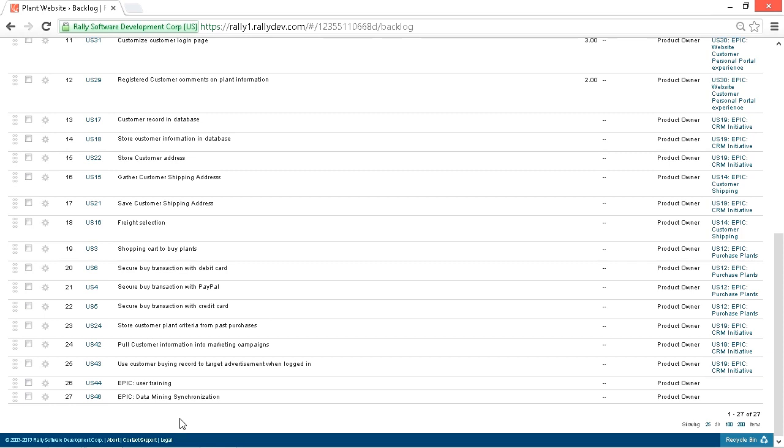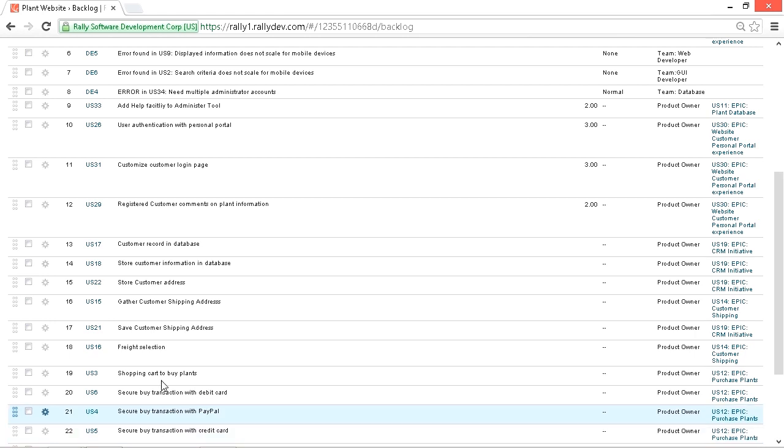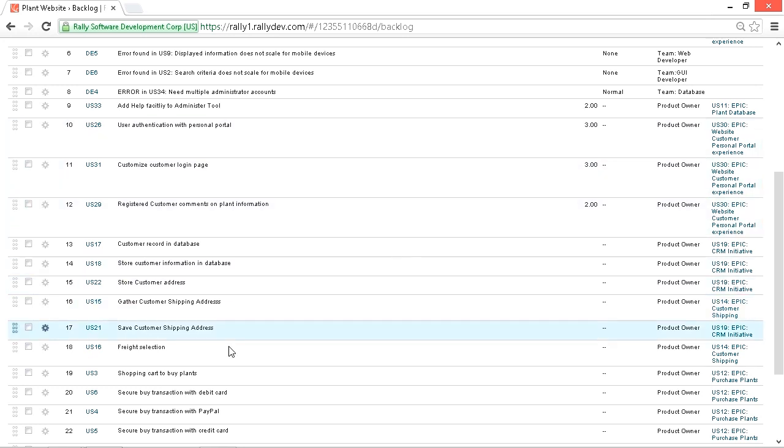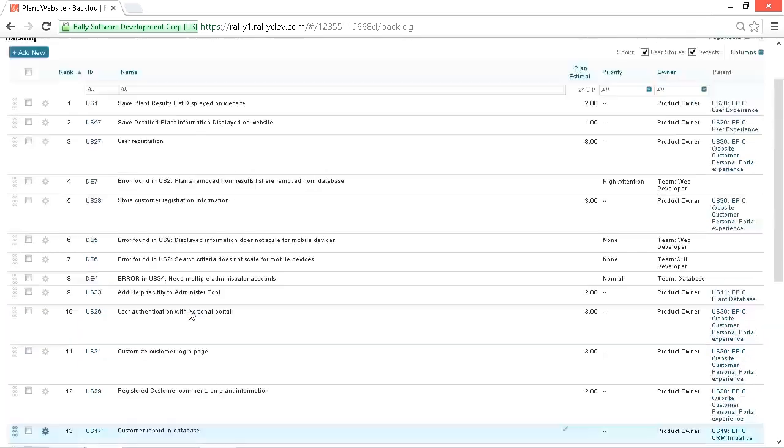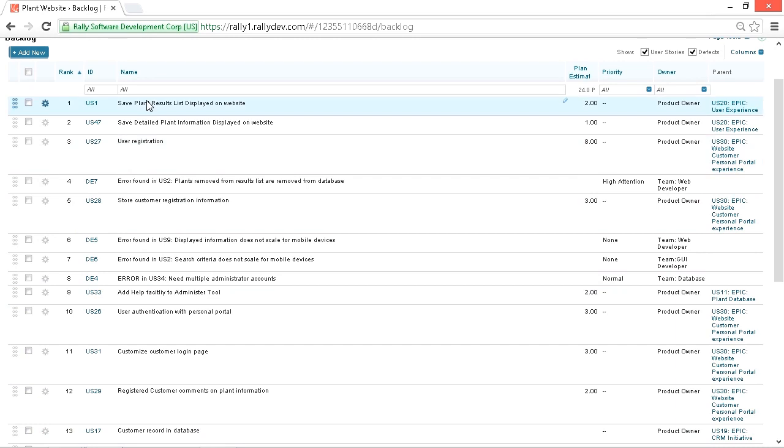As items at the top of the product backlog are work, the high priority items, these will move up. And they need to be split into large user stories. They're not small enough to really do an estimate for yet, but they're much easier to understand and discuss to see how to split them up even further. Once they get to the top of the product backlog up here, this is where they have to be sized appropriately because these are about ready to get to work, to be pulled into a sprint to be worked. They need to be discussed, details added, acceptance criteria has to be good, and they need to have a good estimate assigned to them.